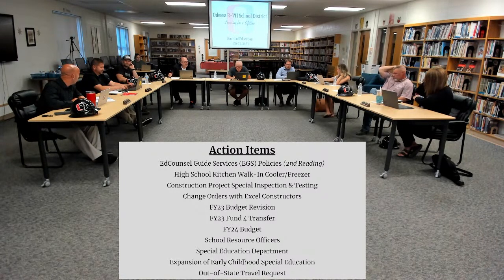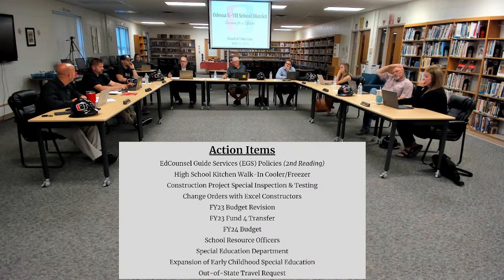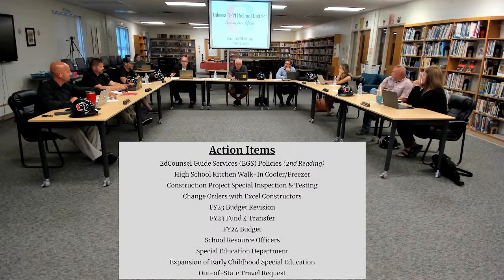And then part of it was their willingness to use the existing equipment on the cooler instead of buying new. Okay. Since it was so new, that was a large portion of it. The funding for this is already built into the budget. The schedule on that? Mike has worked with them on that, and they're aware of when summer school ends and when regular school starts, and don't feel like that's an issue.